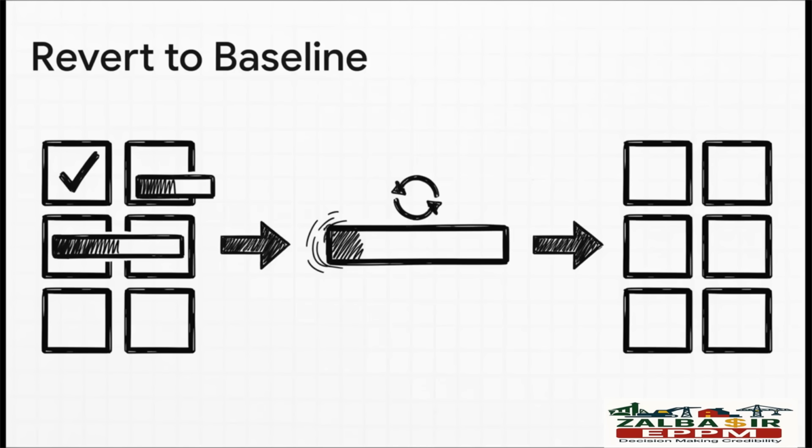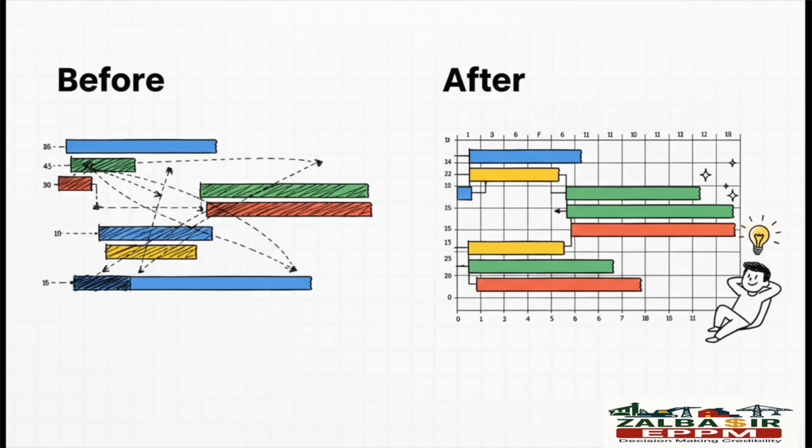So instead of touching every single activity one by one, you can build a set of rules to just systematically reset the whole schedule. You'd basically tell P6, hey, find any activity that started or finished, reset its progress to 0, and then change its status back to not started. The tool automates that entire sequence in one perfect, flawless operation. And that right there is the true power of automation. It isn't just about being faster. It's about being accurate and, more importantly, freeing yourself up to focus on the things that actually require your brain power, the strategic side of project management.